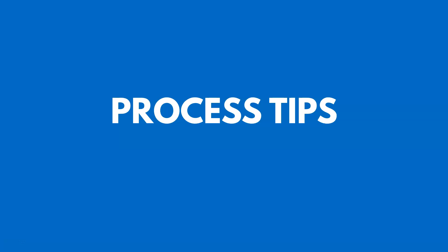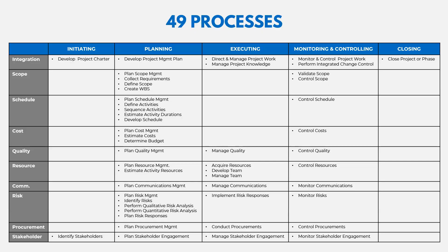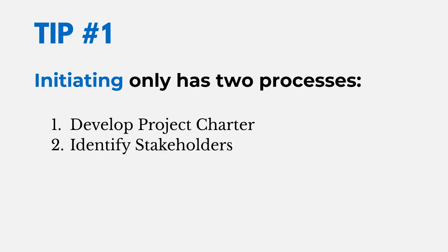Now let's talk about some tips for remembering the processes and which process groups they belong to. We have 49 processes categorized by process group and knowledge area. The first tip is that initiating only has two processes: develop project charter and identify stakeholders.